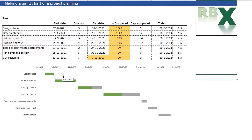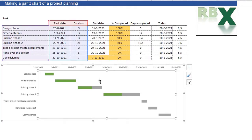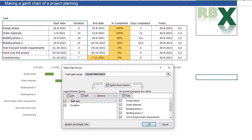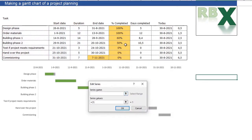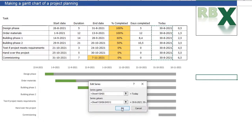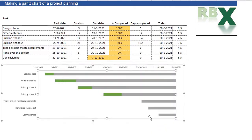The last thing we need is a vertical line indicating today's date, so you can easily see your project progress. We right-click the chart, click Select Data, and add another data series named 'today'. The values are the column with today's date. We click OK, and we see gray bars appear — but that's not what we want. We select only that data series, right-click, and choose Change Series Chart Type, converting it to a scatter plot.